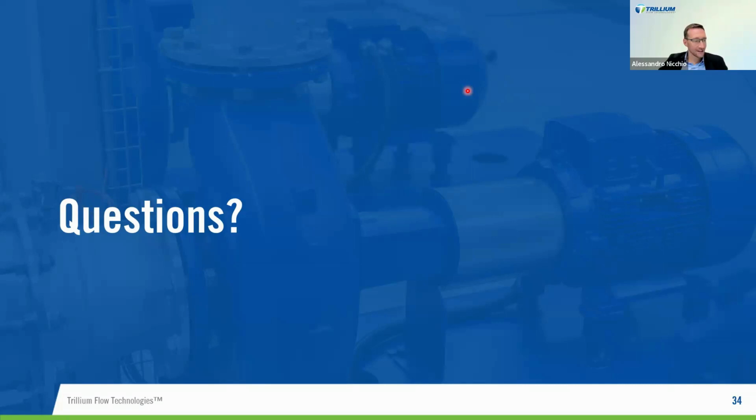Alessandro, back to you. Yeah, I think that this last reply also replies to another question, which is asking why, if the supply of a new pump was considered instead of this re-rate. That's a matter of keeping the same constraints. So yes, there may be the possibility to have a smaller unit, but in matter of fact, it means rerouting of piping and a lot of additional constraints that may not be even economic or allowed when you are operating on a platform. And of course, that would have been considered as part of the evaluation, the selection of a new pump. But in fact, at the end of the day, there are advantages on both sides, as the person who raised the question covers. But working with the customer's engineers, they chose what would be the most economic solution. I've certainly found in dealing with any offshore platform, they're very conscious of cost.